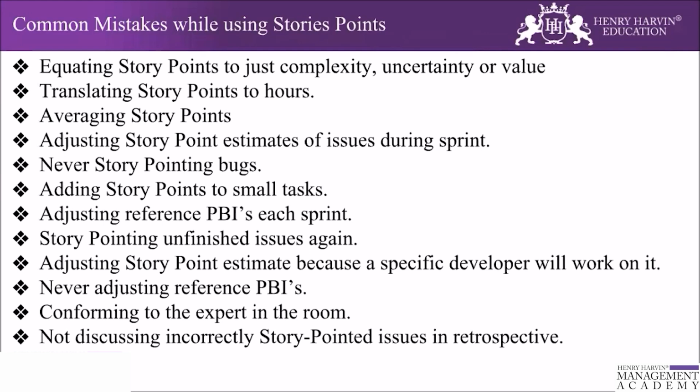It might be possible that some PBI is complex but does not require a lot of time. A product backlog item requires implementation of a complex algorithm, but the team has already done this before, so they would be able to do it quickly. So the opposite can be true. A simple PBI can take a lot of time: the team needs to refactor a small piece of code affecting a lot of functionality. As a result, a lot of functionality needs regression testing, and that will take a lot of time. So don't base it just on complexity, uncertainty, and value.